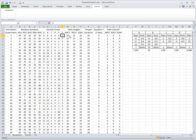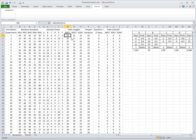The path length is computed as the sum of activity times taken from these columns. This is taking activity A, B, C, and F durations adding them. That is the length of path ABCF, and then the same for ADCF and ADF.